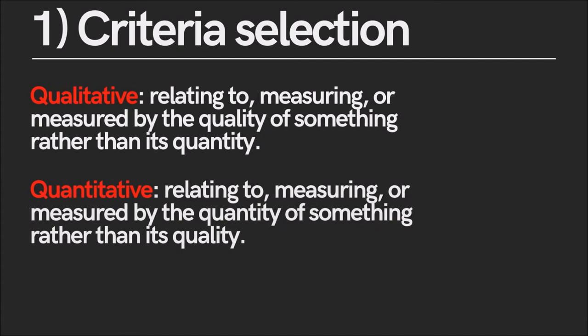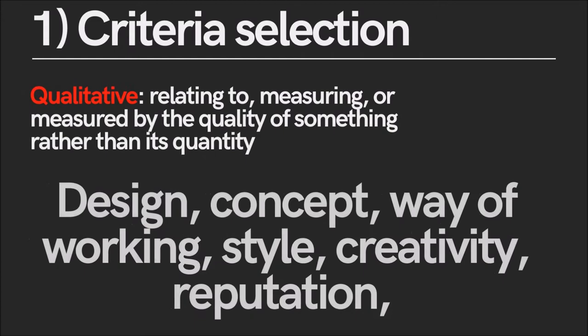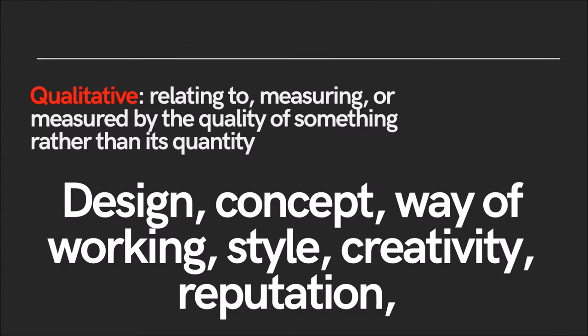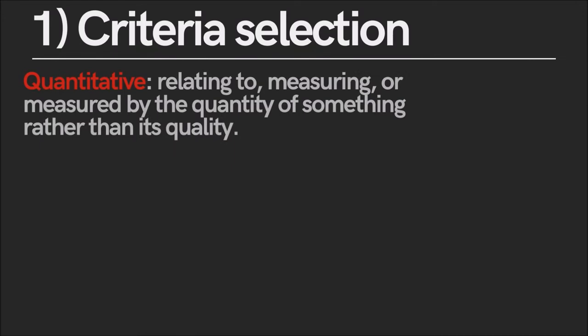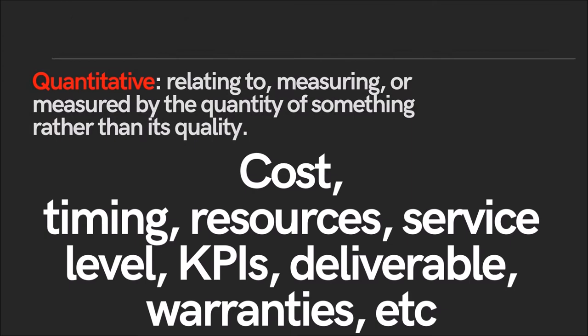Number one, define the criteria for selection. There are two types of criteria: qualitative, which focuses more on your perception, and quantitative, the ones that you can measure. In the group of qualitative criteria you can find creativity, design, concept, way of working, style, and even reputation. In the group of quantitative criteria you can find cost, timing, number of resources the supplier is applying, service level, KPIs, deliverables, guarantees, etc. — all criteria that you can compare because you can count them.